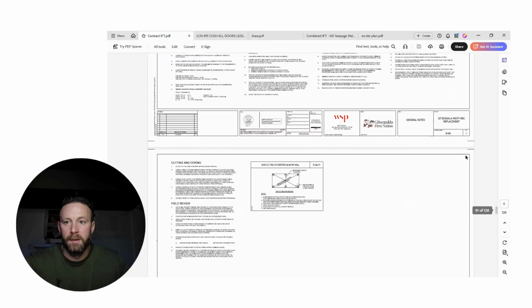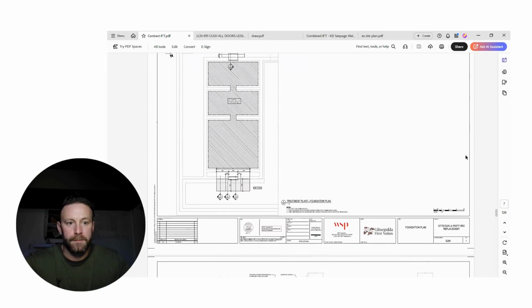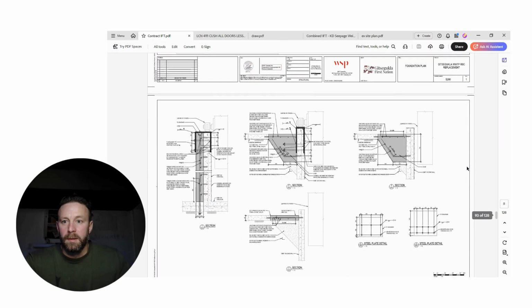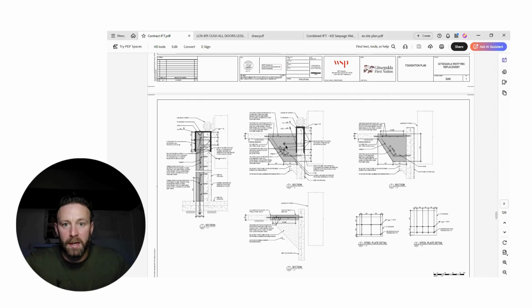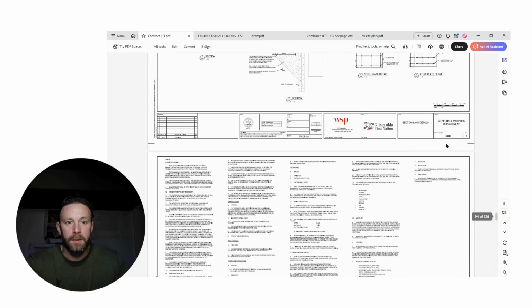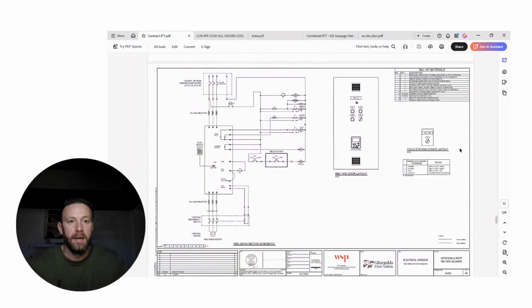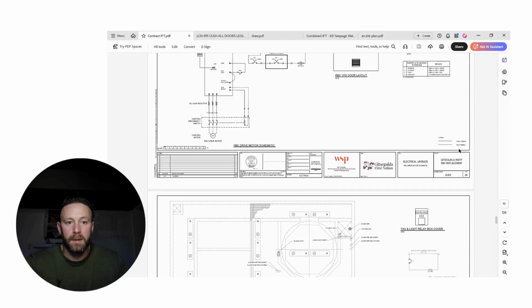Cutting and coring. This is a foundation plan, so I can see there's going to be some concrete work in here. It looks like we've got to hammer out some of the slab and add a thickening and a steel plate here. So I'm going to need millwrighting as well, so I'll need a millwright outfit. I'll need a fabricator, rebar. We're a general contractor, so we do most of the concrete work, carpenter, labor, operator type work in-house, and the rest we sub out.